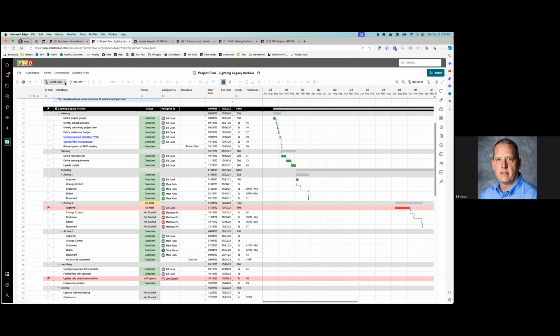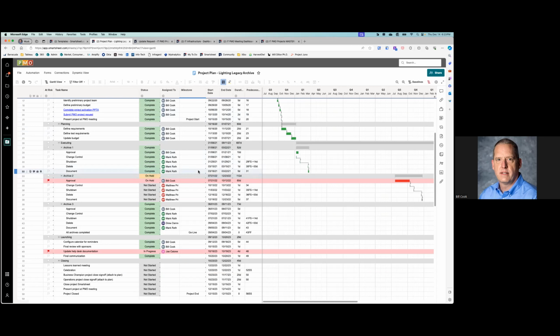So in the early iteration, the dates, let's say for milestones, appeared automatically on dashboards. In this version, I can control that. So this column is the milestone column. We ask project managers to give us 3 milestones: project start, go live date, and project end. They can go in this drop down here, and they can create all kinds of milestones. And they can also just type their own name for a milestone. So they can create milestone tasks however they need to, link them to other tasks however they need to, and have the dates that they need to.